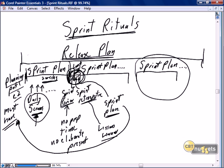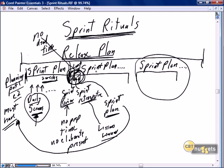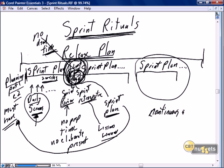They all happen immediately adjacent to each other. There is no dead time. We start the next sprint, do daily scrums, then a sprint review, a sprint retrospective, a sprint plan, and so on. What I really want to drive home here is that the period of time between sprints has no dead time. We spend our two weeks, complete our stories, and immediately start the rituals of the review, the retrospective, then launch directly into the sprint plan for the next sprint. Continuous process — no timeouts.